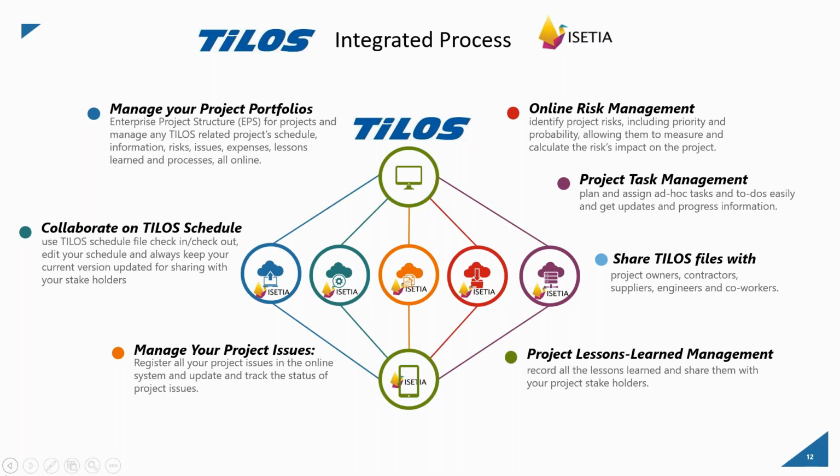We provide risk management capabilities in ISETIA, and when you use Tilos and plan your project with Tilos, any kind of risk you can register in the system by category, by type, by priority, by probability, and you can also measure the risk impact on your project cost.